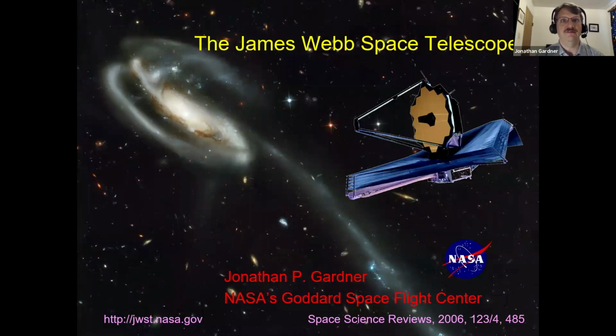For example, the example I gave earlier in the talk was we build the microshutter array, we test it with the vibration and acoustic, then we assemble it into the NIRSpec instrument, we test the instrument, again, vibration and acoustic testing and vacuum testing. We then assembled the NIRSpec into what we call the ISIM, the Integrated Science Instrument Module. We tested that, both vacuum testing and the vibration and acoustic. We assembled the ISIM onto the telescope, did more testing, and the telescope onto the sun shield. And now when it's all together in one piece, there will be a final vibration and acoustic test of the whole observatory. So yes, it's definitely an iterative process. We test everything at the component level and build it up and test it again.